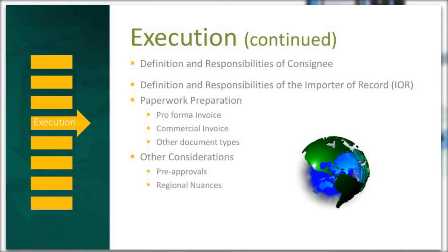Also keep in mind, before exporting your ancillary supplies, you may want to consider seeking pre-approval of your documentation with your registered importer in country. Your registered importer will seek counsel from their assigned registered customs broker in country before the exportation. So when the goods arrive, the registered importer will seek the power of attorney with their broker in country to assist in the clearance process with the courier, carrier, and customs.